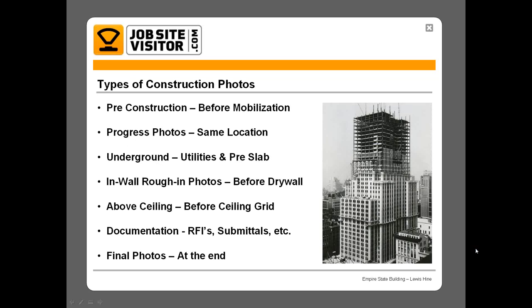So when we talk about the different types of construction photos, we've got pre-construction photos, and these are photos that are taken before you mobilize on a project. It's important to document all your surroundings before equipment arrives and you start working on the project, just because there tend to be issues that surround projects at the end, depending on how buildings were affected or open space was affected and that type of stuff. So it's great to have good documentation before you get started on your project. This is basically answering the question of what the site was like before you got on it.